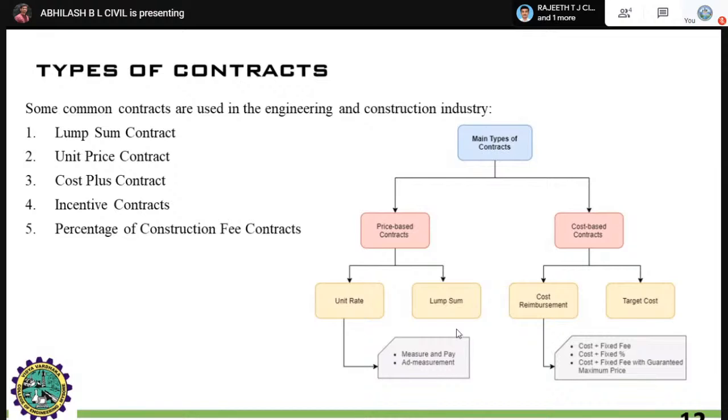For example, for civil, for chief engineers, there will be complete authority, that is full power for the acceptance of any amount of finance. Next, the same chief engineer and superintendent engineer will have this full power. Next, coming to the executive engineer, up to 5 lakhs. There will be only up to 5 lakhs power. Coming to the district engineer, that will be around 50,000. Whereas at the last, the assistant engineer will have approval up to 20,000 for a particular project. Like this is how the tender notice will be procured.